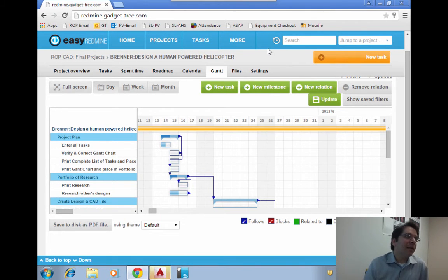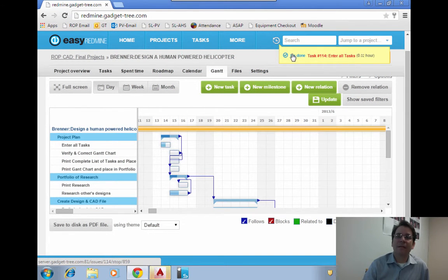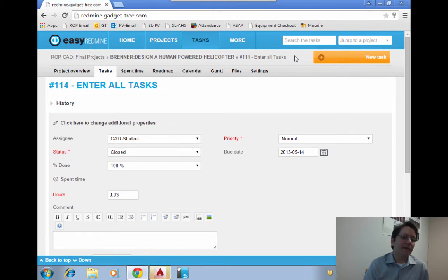Now, let's say it's the end of the period. I'm now done with my task, so I'm going to close that out. I'm going to click on It's Done, and even if you're not done, you still click It's Done. Let's say I'm only 50% done, so I'm going to change this to 50%. And then status here, this is important, I'm going to say in progress. This is only if I thought I'd finish today, but I didn't. I'll do the rest tonight or tomorrow. So I have in progress, 50% done.